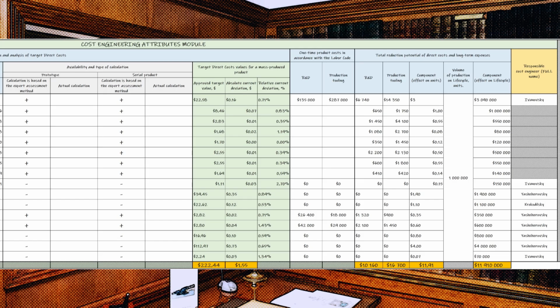Speaking specifically about our case, we do not have actual calculations because we are obviously either at the pre-design stage or at one of the milestones corresponding to the development of the design engineering documentation, that is, at milestones preceding mass production. There are dashes for standard products and purchased parts, and this tells us the supplier refused to provide a calculation. This often happens in practice.